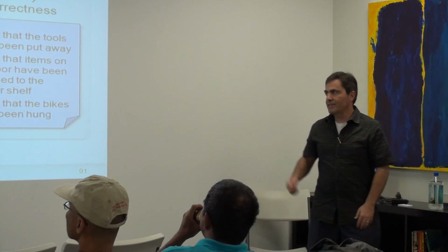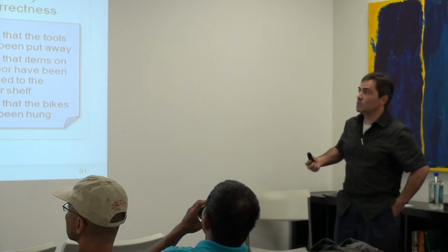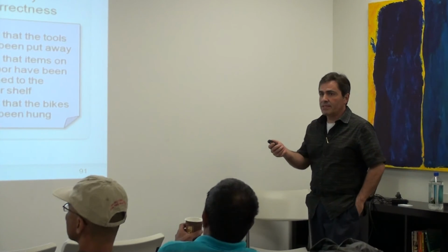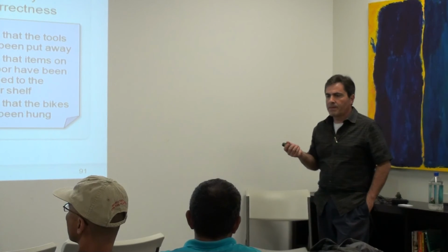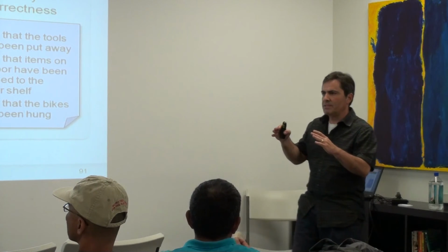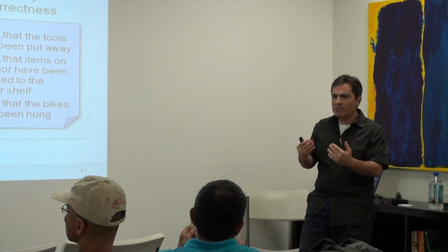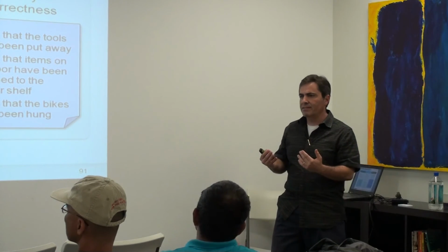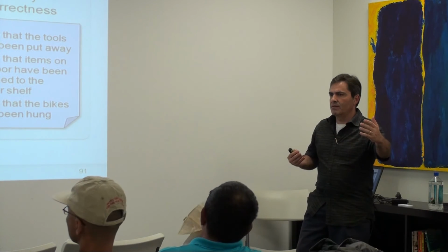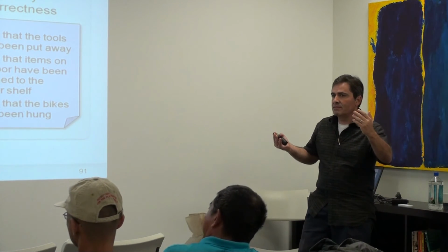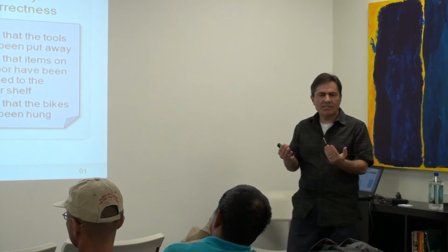So one of the thought leaders in Agile, his name is Ron Jeffries, came up with this concept of the 3 C's, which is you start out with a user story, but then the idea is to have a conversation. And this is what I was saying earlier, a lot of development teams are so used to that monologue. They expect the product owner to be omniscient and tell you exactly how to integrate our app with Salesforce.com. The reality is, they have a need, they don't quite know how to get there. You need to have this conversation.